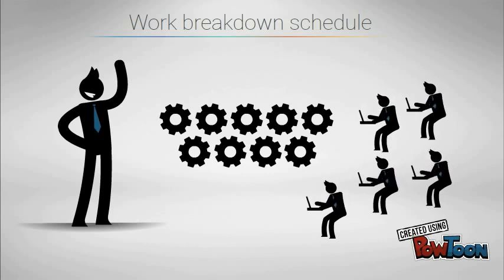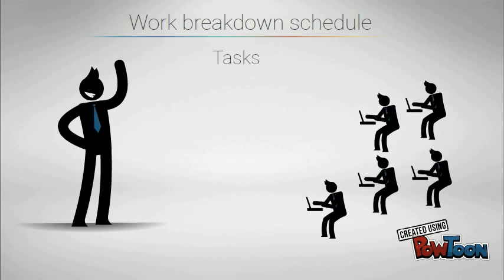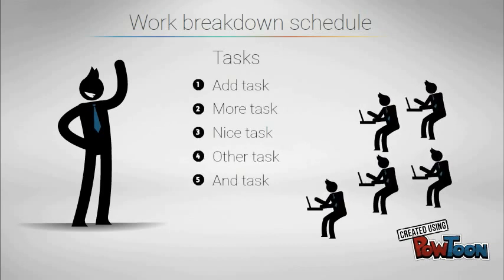At this level, the specific work packages required to produce the sub-deliverable are identified and grouped together. The work package represents the list of tasks or to-dos to produce the specific unit of work. If you've seen detailed project schedules, then you'll recognize the tasks under the work package as the stuff people need to complete by a specific time and within a specific level of effort. Remember, the WBS is illustrative only. It is not intended to represent the full project scope of any specific project or to imply that this is the only way to organize a WBS on this type of project.